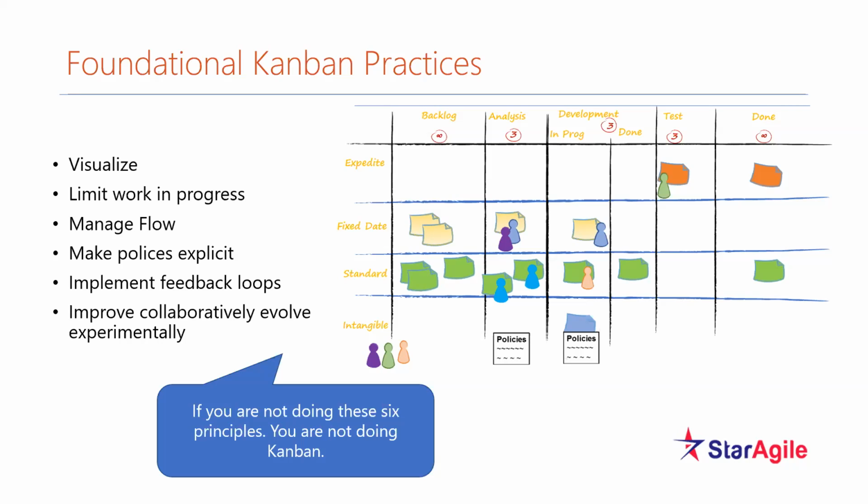There could be various policies, and when you have these policies, what does it mean for all the developers? They exactly know what it means when they say it is done. You don't have to keep telling them, you have not done this, you have not written unit tests. The policy is very clear. When you are writing an artifact of a front end, an API, a schema, or indexing, these are the policies for the various artifacts. The policies could differ, and we come onto the same page. Then the team together, collaboratively, discusses and manages the policies, which can be added, removed, and so on, right?